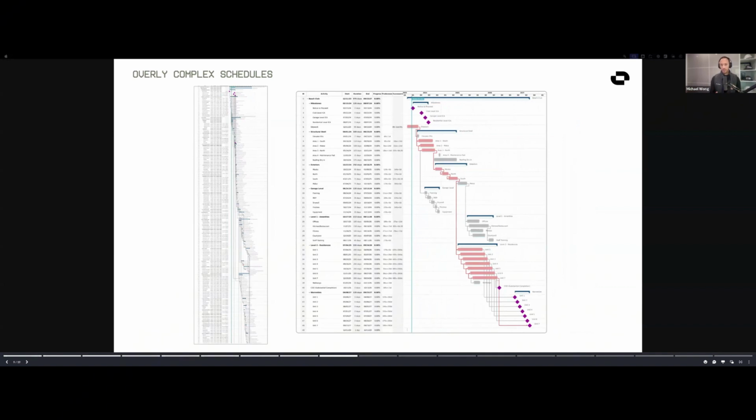It takes a little bit of effort, a lot of involvement from your team to understand the parts that are important of that schedule and tie logic and understand your connections between different milestones and phases. But from one to the other, you can definitely get there in only a couple sessions too. I've had multiple use cases at this point where I've sat with a team that had more than 1,000 line items in their schedule, and they got it down to 200, right?